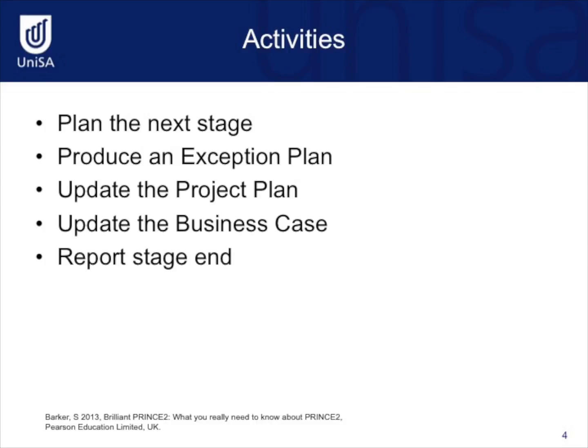An exception plan is a plan that replaces the current plan if a project has some issues or problems and then exceeds or is expected to exceed a tolerance. If this is the case, it must be reported to the project board, who then decides on the follow-up actions. If the current plan can no longer be continued with, a new plan needs to be created to reflect the new project scenario. This replacement plan is called an exception plan. An exception plan can be created to replace a project plan and/or a stage plan.